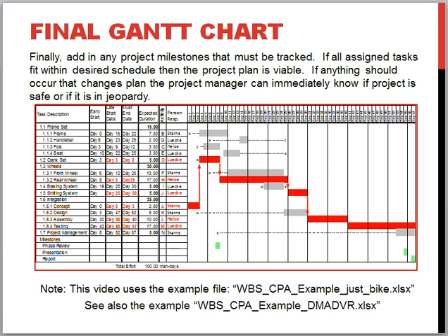Once we get that put in, depending on what convention you want to use, in my case here I've used the same coloring convention that we have in the Demandler toolbox. So we've taken all the planned schedules that are non-critical and put them in gray. The critical paths are denoted in red with arrows denoting the flow of the predecessors and successors of each process, and then put in some milestone events here related to a phase review, a presentation, and a final report due date.